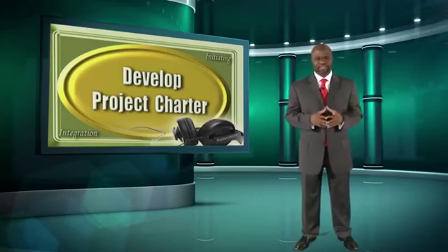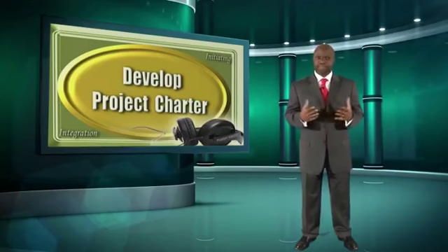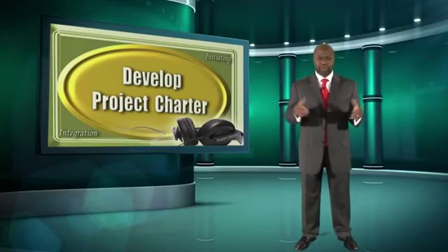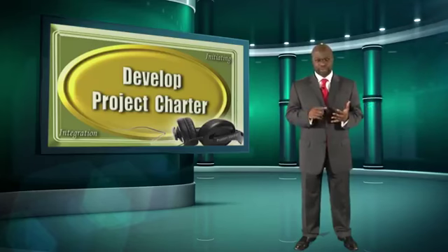What else does the project charter do, apart from identifying the project manager? It also identifies the project sponsor or initiator, typically signed by a manager external to the project and at a level that is on par with the project. So you want someone who knows about the project, who is in management, and someone whose signature on that project charter actually means a lot to the people reading it.